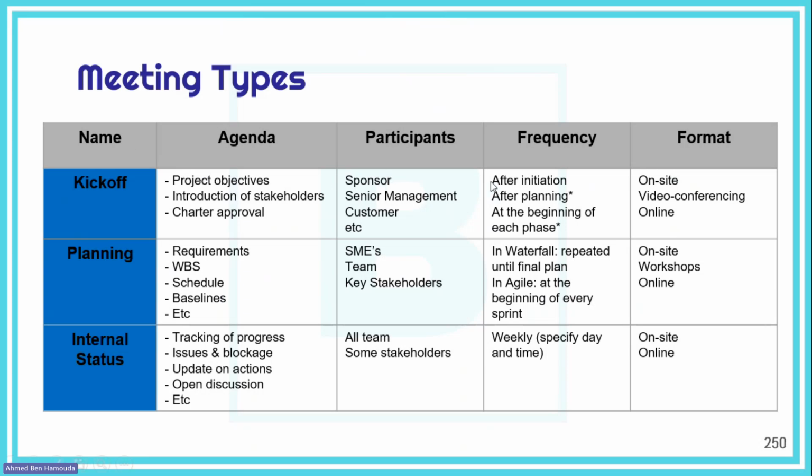Okay. However, in some projects or in some project management practices, the kickoff meeting does not happen just after the initiation. I've put here frequency after initiation, generally it's after initiation, but sometimes we can also have a kickoff meeting right after planning. So we have a first kickoff meeting after initiation, because during the planning we're going to use time, resources, etc. So then we will have another kickoff meeting after the planning, just to validate the project plan with the stakeholders.